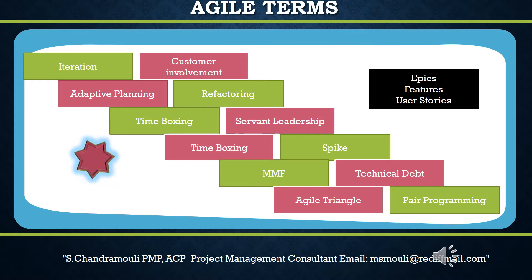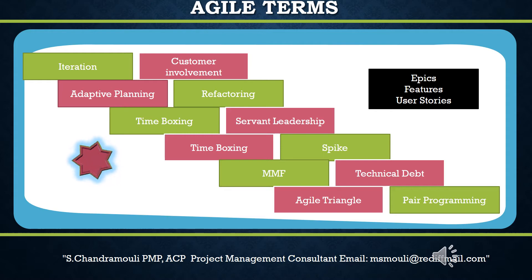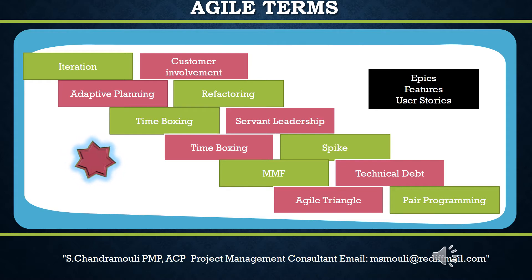Fifth, the agile triangle: in traditional projects, scope is fixed and time and cost are the driving factors. In agile projects, time and cost are fixed through time boxing, but scope is not fixed for the entire project in a single stretch. Scope is developed using just-in-time planning for the iteration. So the agile triangle is the inverse of the traditional project triangle, where time and cost are at the top and scope is derived from those at the lower side.